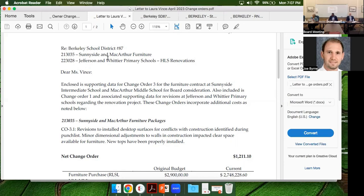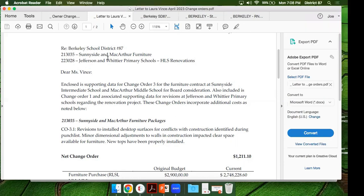As a team, we made the decision about 2 weeks ago to release the light poles, the 9 new ones, just to get them in the queue. But we don't expect to receive light poles themselves until probably August. So we'll get all the underground work done, get all the concrete bases in, be able to landscape and finish up, and then we'll pop back in and put those poles up as soon as we get them.